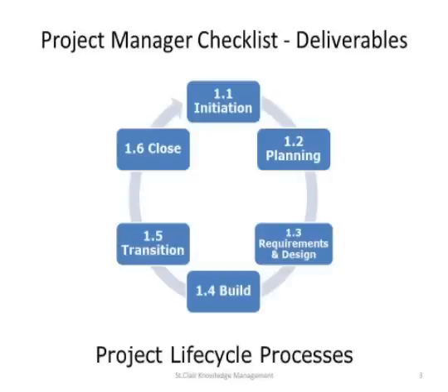So it's a top-down process. What are the business goals? What deliverables or things do I need to do to support those goals? And then what activities or tasks do I need to be working on to complete or to create these deliverables? And then for each of your tasks and activities, you can then assign people to them, you can cost them, you can look at your start and end points.